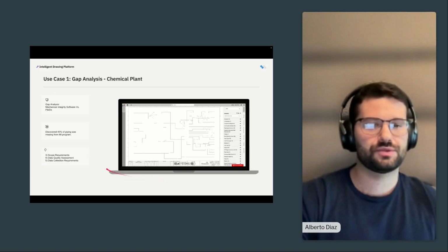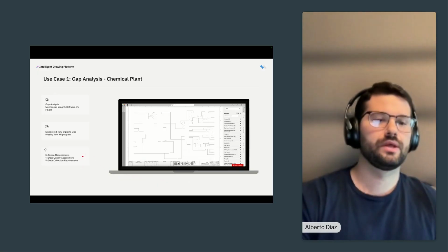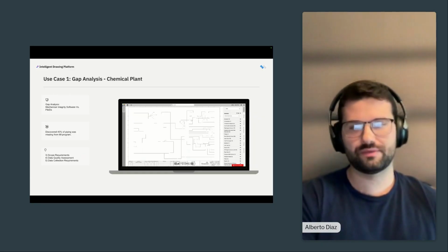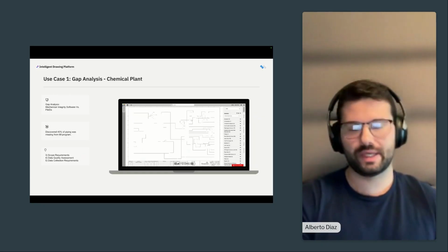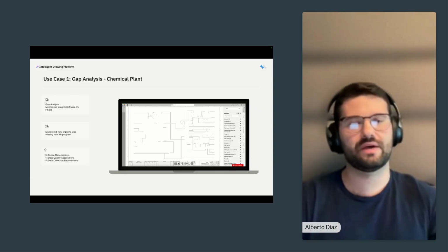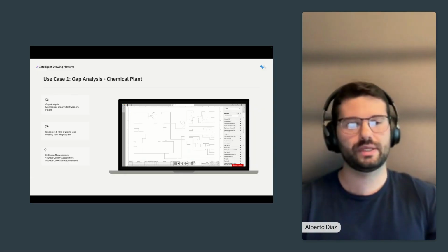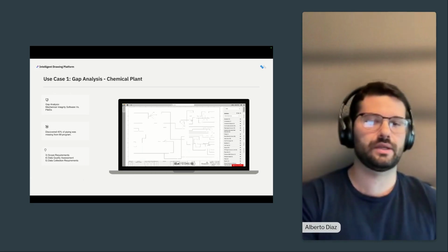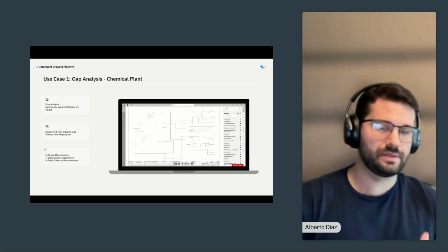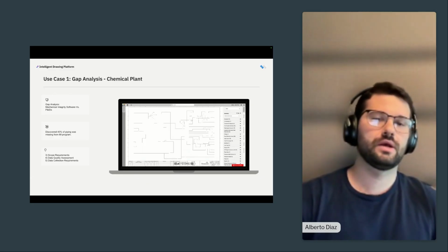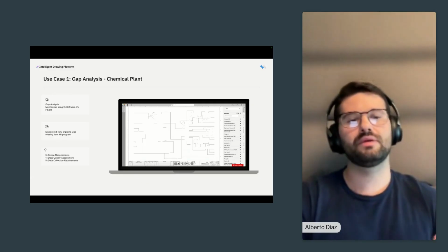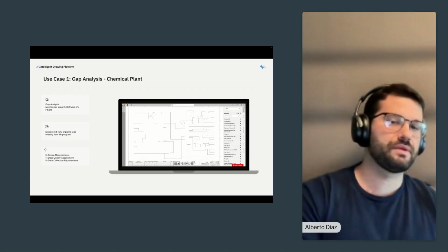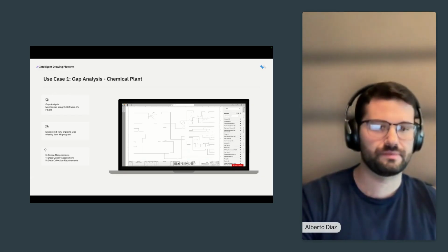And if we tie that back to the themes within the use case, it first goes to scope requirements. Regardless of whether you're starting from scratch in your mechanical integrity approach or you already have a robust program in place, if you're trying to figure out how many assets you're going to implement in your mechanical integrity program, the P&IDs are a very solid place to start as far as what the inventory should be, in order for you to scope out what the implementation efforts are going to be from a mechanical integrity program perspective.